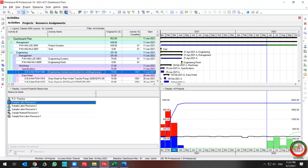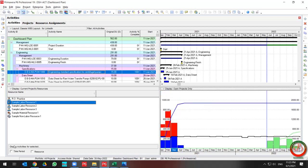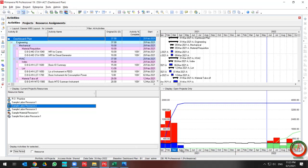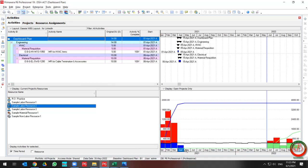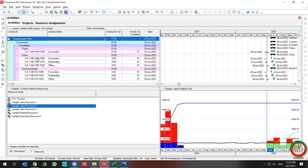If you want to filter by time or by resources, go to the right pane and deselect Show All Projects. This enables two filters. You can then filter by time period — select your resource first, then go to the time period, and the activities belonging to those resources will be listed in the above section.